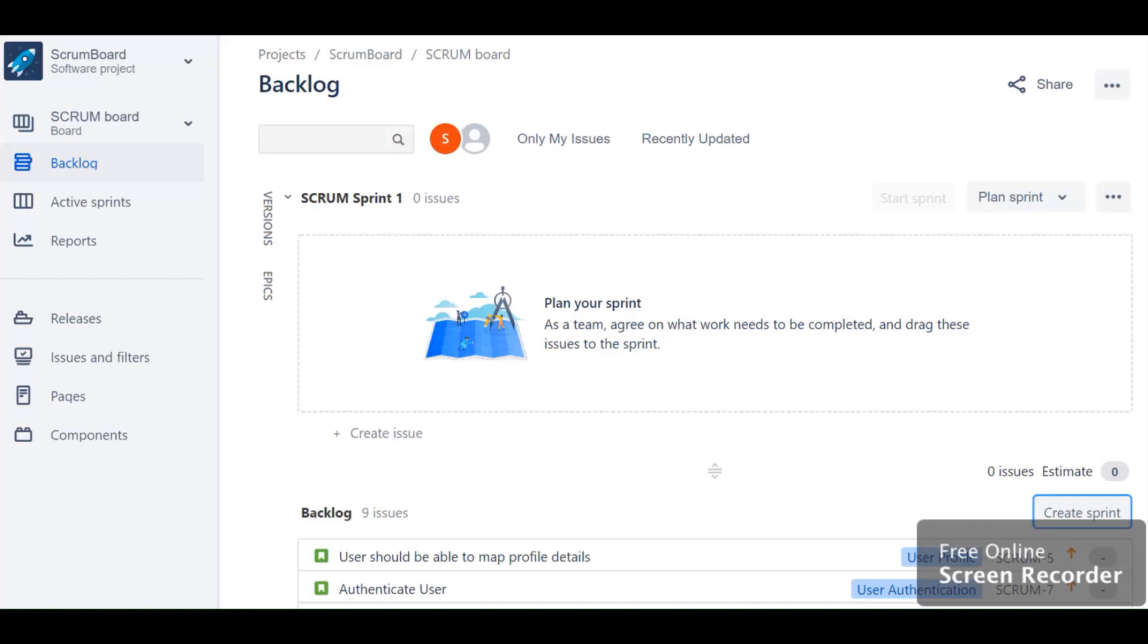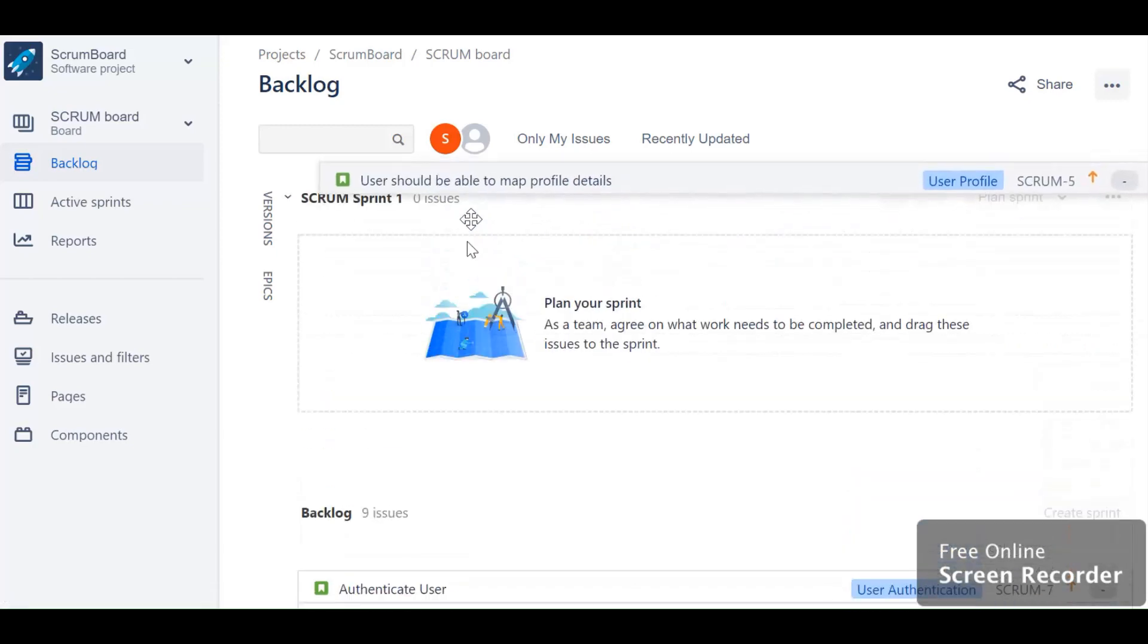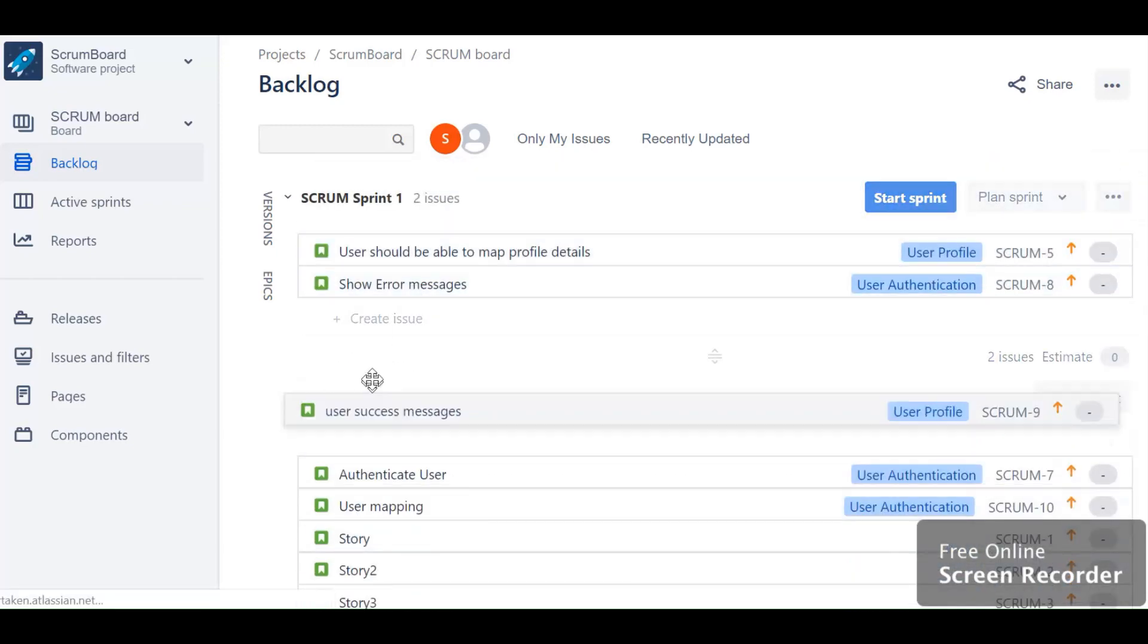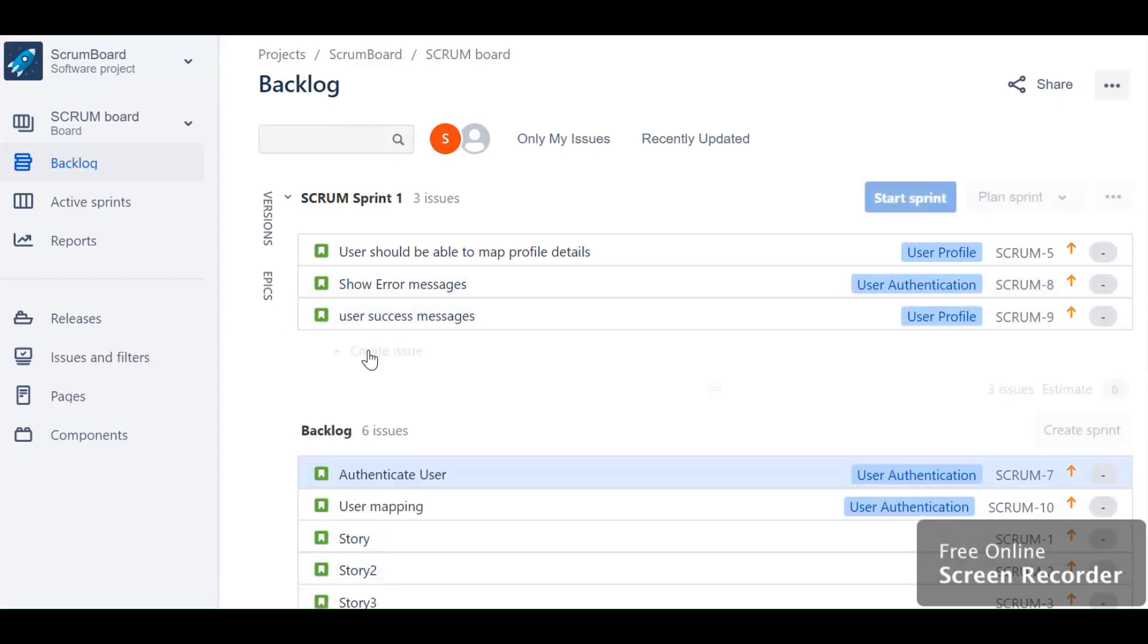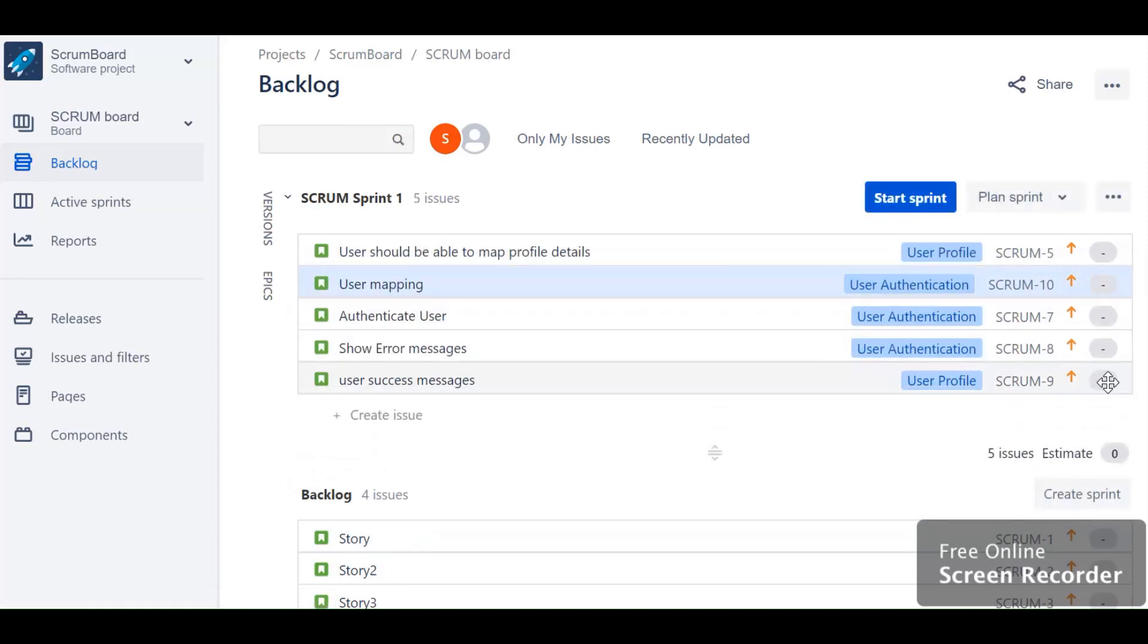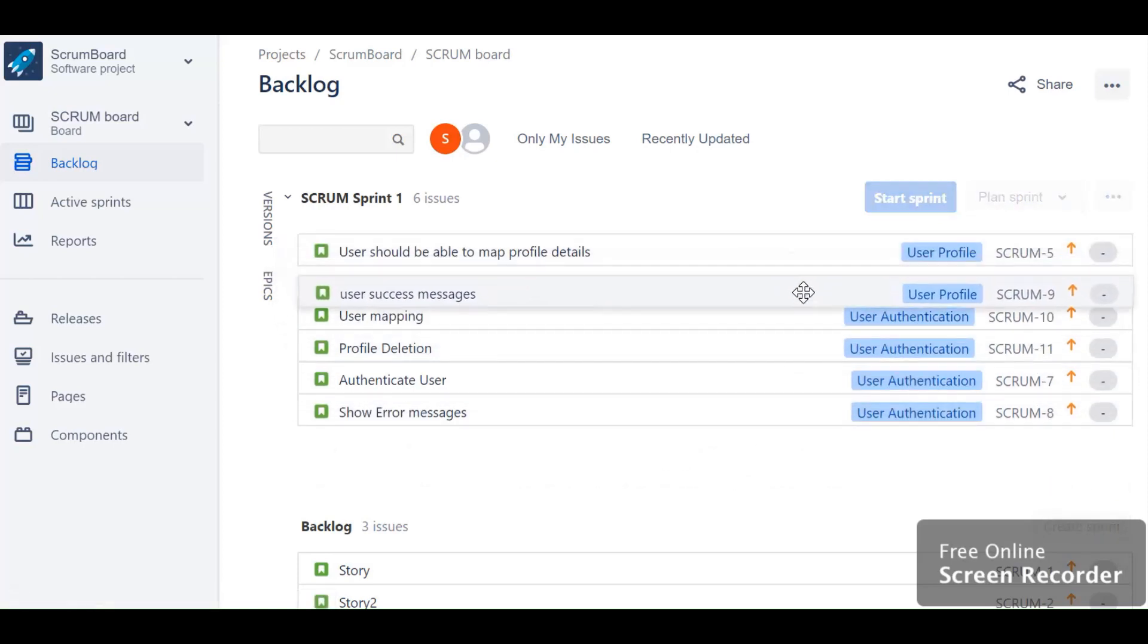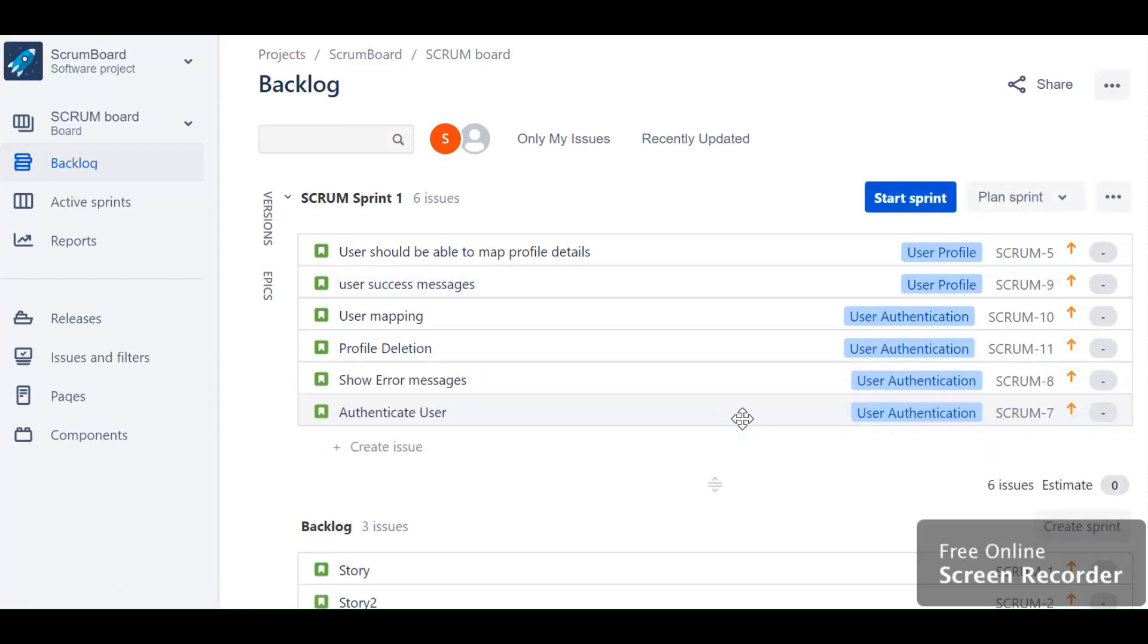For example, I want to do this set of stories in my sprint one, so feel free to pick whatever you want from the backlog by dragging and dropping. This is a very easy way to pick the stories. In case you want to change the ranking, just drag the story above any other story to change the ranking. This is a very useful feature for project owners and product owners.